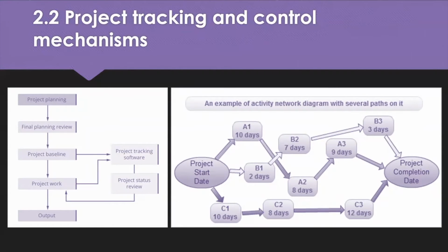You will need to think about tolerances and exceptions, because there are going to be things that fall outside the norm. And you can use a kind of traffic light method. Green work is within tolerance. Amber is within tolerance, but is likely to depart from it if we don't take some action. And red works have exceeded tolerances.